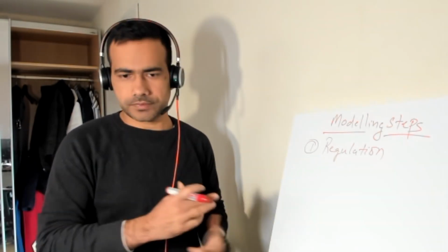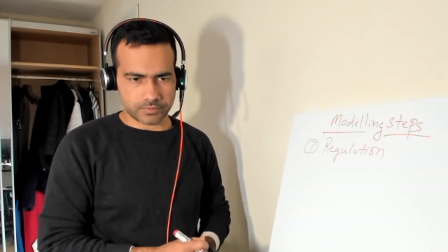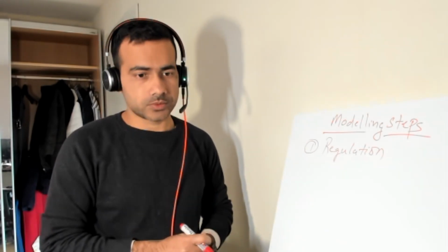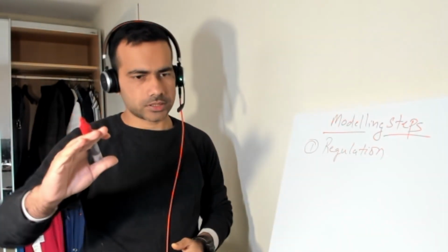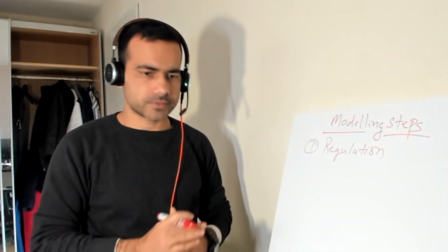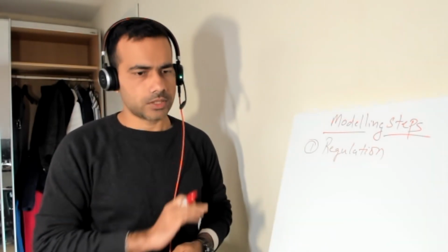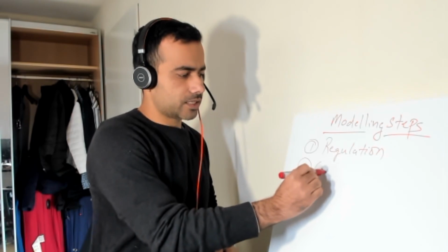But even if they are people who will be using the outcome of the project indirectly, you will still talk to them. This is very important to know because if there is a significant change towards the end of the project or even in the middle of the project, it is very difficult to then make changes, and that brings a lot of cost. So it is very important to connect with the stakeholders, as many as possible.